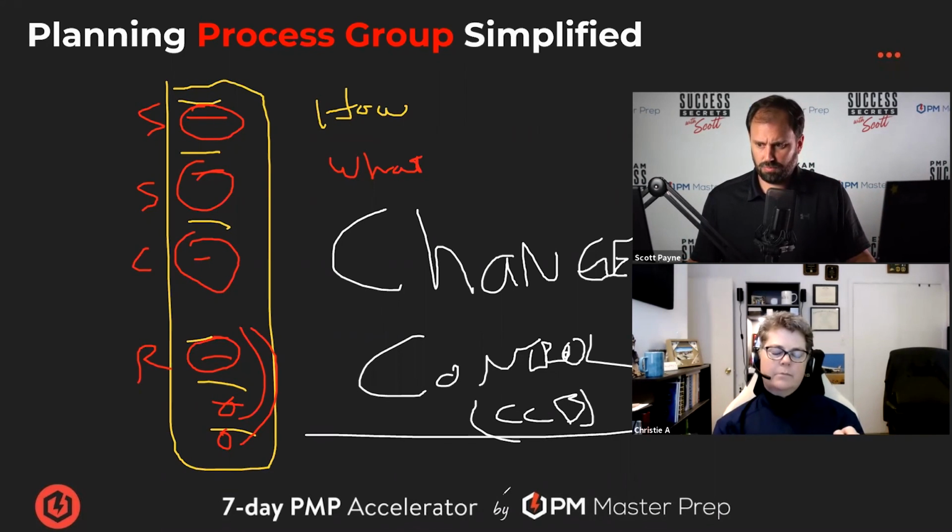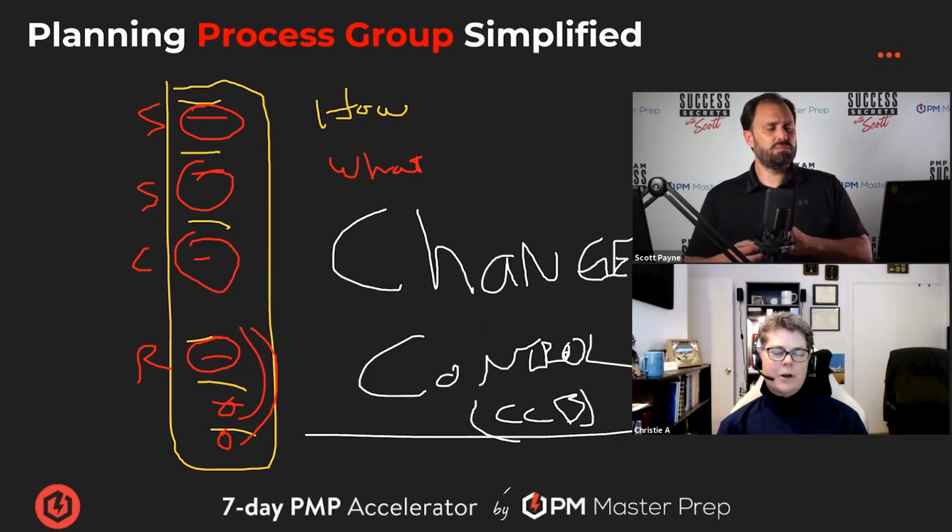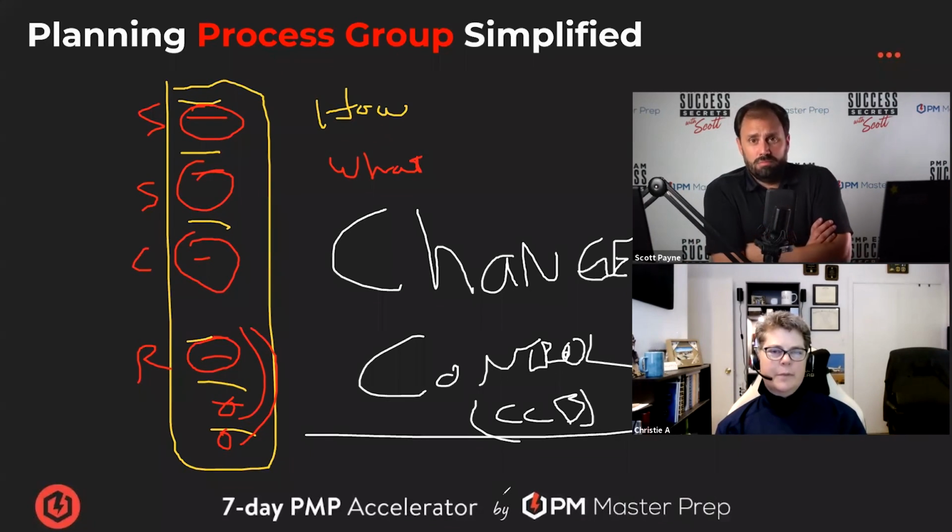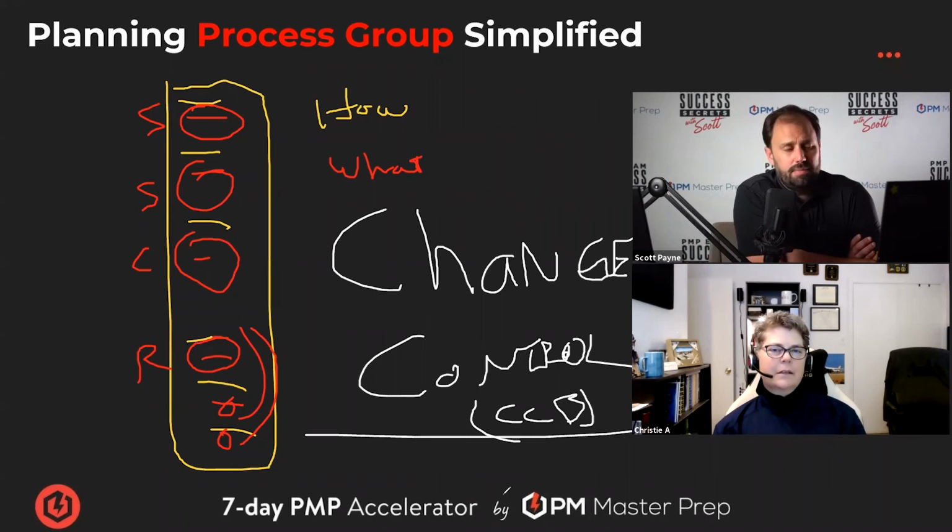I know this is off the process, but you're doing great. Keep going. We're talking about change, and definitely scope, schedule, cost are the big three important baselines. So if the question is saying this action is going to affect the schedule or the cost, then you have to collect the information, analyze it, see what the effect is, and then go through integrated change control.